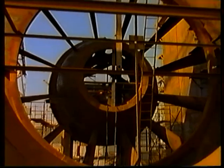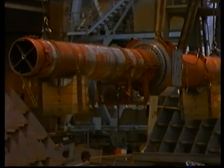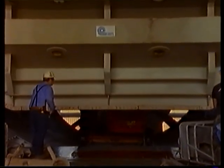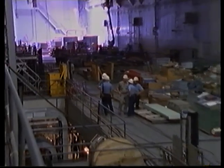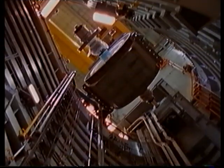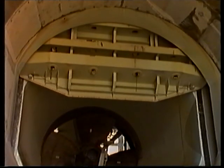The PPS was assembled from 50 and 100-ton modules, with special tools being used for certain machining operations after assembly. The downstream gates, which are used for isolation and also for controlling the flow during stopping and starting a unit, were manufactured to designs by Kvaerner Boving, who also supplied all the control equipment. Installation of the plant at the shipyard was carefully planned at the design stage and closely supervised by Kvaerner hydropower engineers. As far as possible, all items of plant and systems were installed, tested, and pre-commissioned in the shipyard, saving valuable time at site.